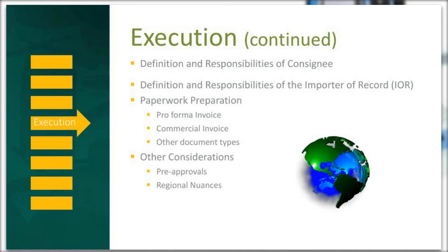In addition to speaking the local language and providing hands-on support, your registered importer will be key in maintaining relationships with the regulatory and customs officials in country, while keeping the knowledge of the database for your ancillary supplies, since the rules change frequently, if not yearly. Your local partners and staff can also provide early warnings about proposed or impending changes that can impact your clinical supply logistics and budgets.